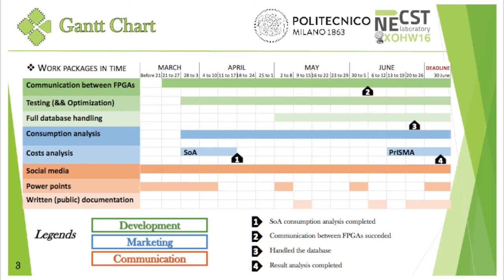The Gantt chart is a bar chart that helps us to show our project schedule. This way it is easier to understand the planning of the work packages in the following weeks, with starting and finishing dates, and also highlighting when we expect to reach our milestones. This task organization is a direct consequence of both the difficulties we think we might meet for the development phase and the dependencies between the work packages.